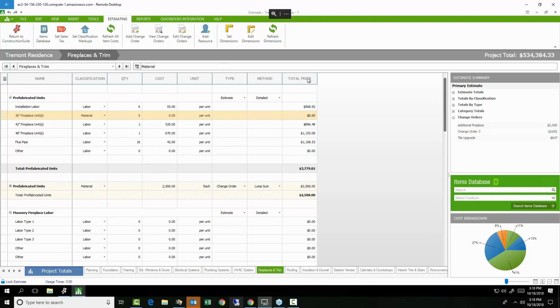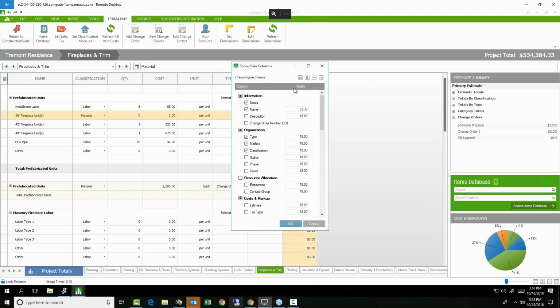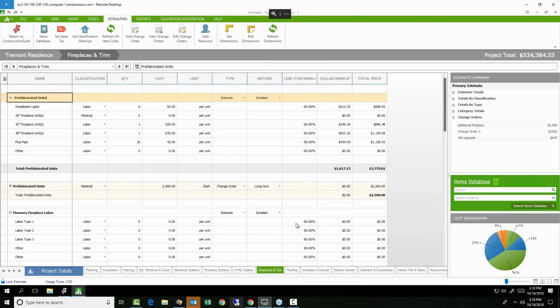hour. Now from there, we will need to turn on to view some of the additional columns to get that markup in there to cover some of these additional expenses in having employees. And that might be just about anything. It could be the uniform expenses, it could be, again, vacation time or sick leave or workman's comp or liability, cell phones perhaps, or travel. All of that gets built in.